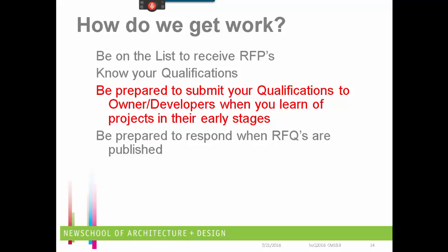Now, what is an RFQ? Well, that's another one of these acronyms we use, and it stands for Request for Qualifications. So quite often, before there's an RFP, there will be an RFQ sent out on a project. And you need to know what your qualifications are so you can submit your statement of qualifications to get on the list in order to be able to receive the RFP.